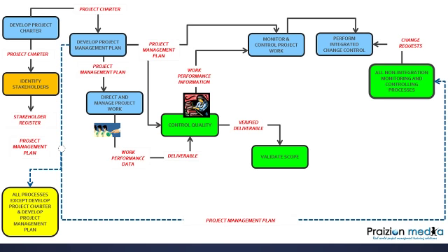If the change request is for something that is a nice to have but not that critical, and that nice to have will throw the project off by an additional 2 weeks, and the project is already 2 weeks late, do you think the change control board would entertain that? No, they wouldn't. There are many other scenarios where a change control board will reject a change request because the current performance is not satisfactory or the current performance is at risk.